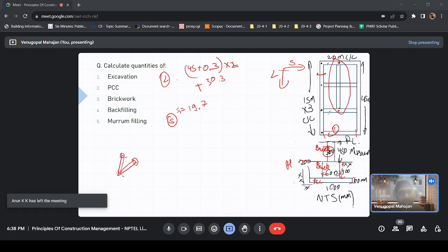And now coming to this one, S2. For S2, you will see that there are how many corners now? You have got one half width here, and a full width here, corners. So for S2, what would be your length now? 19.4. Is it the same for S3? Yes. And same for S4, right? Yes.